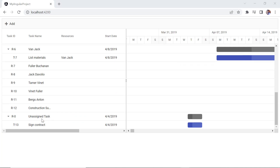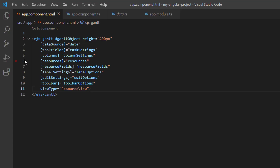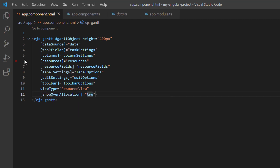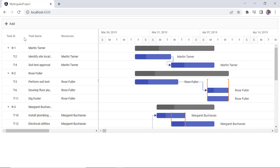What if a resource is assigned to two or more tasks scheduled on the same date? We call this over allocation. I enable the show over allocation property to highlight the over allocation date ranges with square brackets. As you can see, the over allocated tasks are highlighted in square brackets.